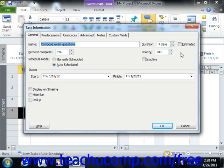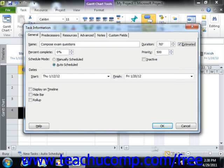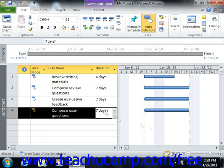You can also perform the exact same activity by simply typing the question mark at the end of any duration that you enter into the task list within the duration column. These are just two different ways of performing the same activity.